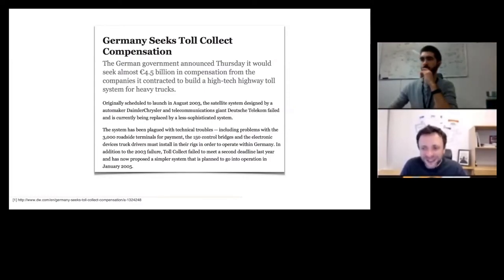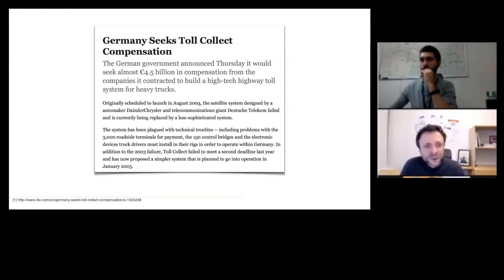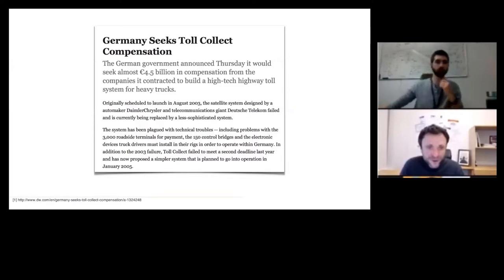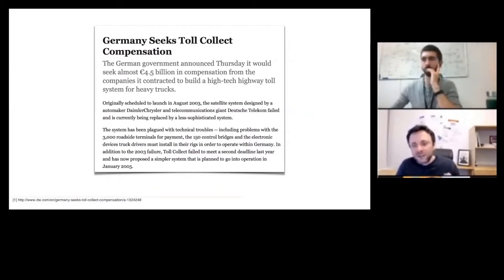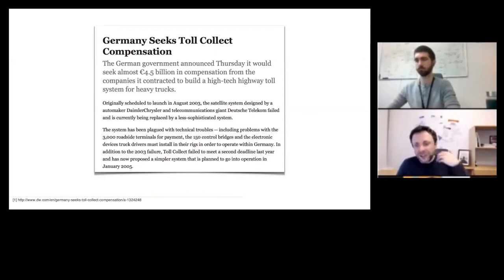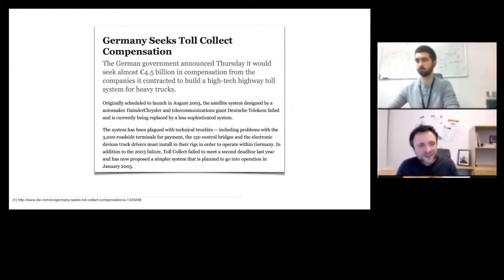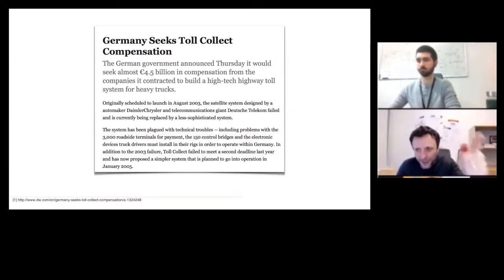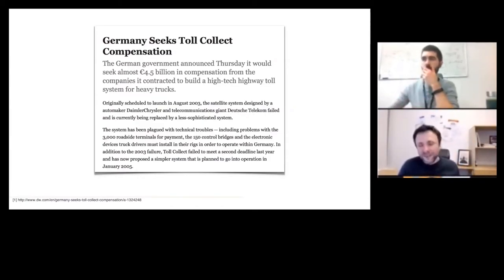Toll Collect is one of the favorite examples of every lecturer in any engineering course, because literally everything that could go wrong in this development project went wrong — especially interesting from a perspective of project organization and management. A couple of years later, at a meetup, I met one of the architects who told me a story: Toll Collect was continuously in use, continuously over budget and over time. At some point, they decided that satellites were not possible, so they changed to sensors installed on bridges over the highway for direct measurement whenever a truck passes by.